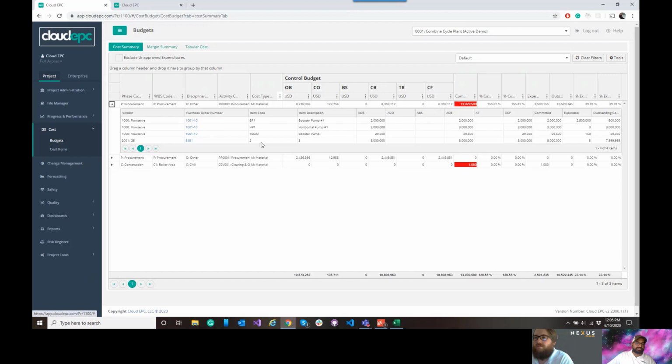There are settings in the system that will allow you to not create commitments higher than the budget. In this demo account, we've turned that off and we are able to create commitments higher than the budget. So there are business rules and configurations that exist. We often find, though, that when we're integrating with an accounting system, as this demo account was designed to do,